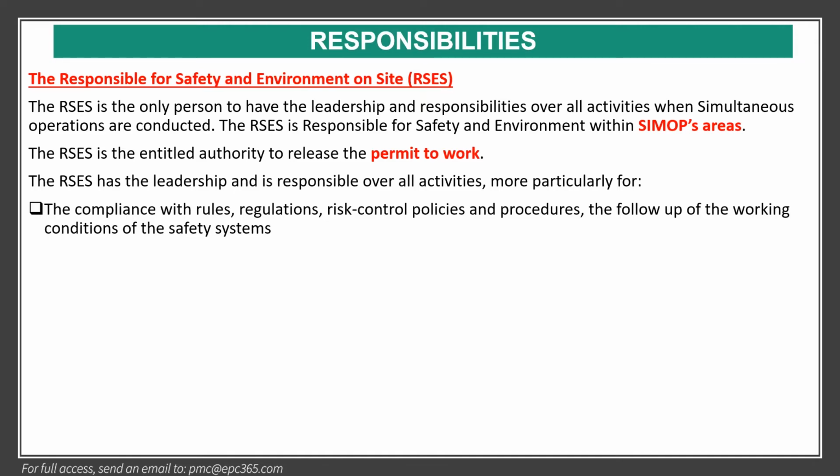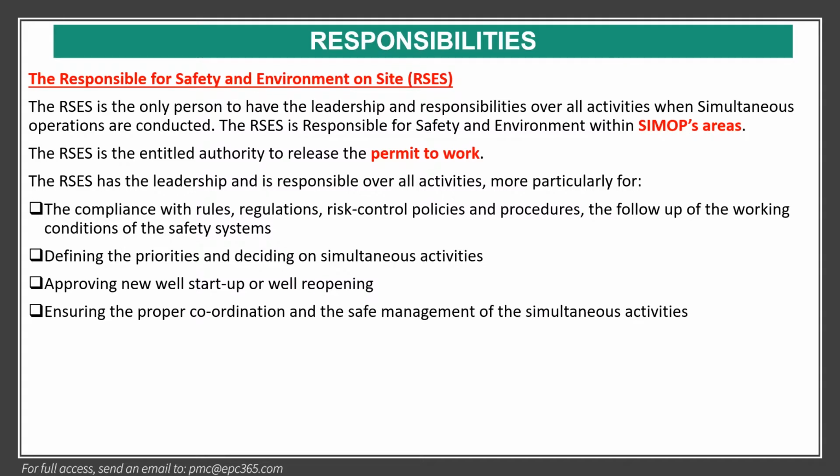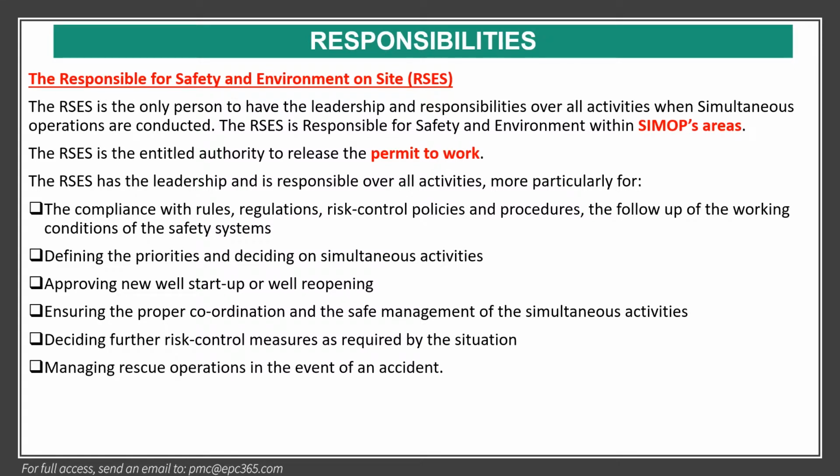The RSES has the leadership and is responsible for activity, more particularly for compliance with the rules, regulations, risk control policies and procedures, and the follow-up of working conditions of the safety system. Also defining the priorities and deciding the simultaneous activities, approving new well startup and well reopening, ensuring the proper coordination and safe management of the simultaneous activities, deciding further risk control measures as required by the situation, and managing a rescue operation in the event of an accident. And RSES is permanently present on the site. Very important.